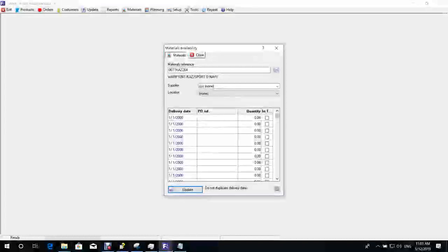Sometimes we don't have materials, so we book it from the beginning. And sometimes we have fabric in store now. So if we have the fabric in store, we will record it as available when we receive the official PO. And we will give a date for accessory, because the accessory is always not available in the stores. We give him 2 weeks, 3 weeks, 1 month according to the type of the accessory.